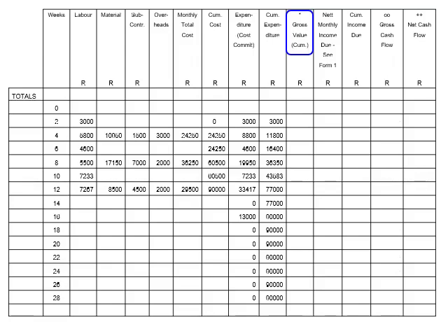For example, let us add 10% to 2000 by using this technique. 2000 times 0.1 is equal to a fraction of 2000, and equals 200, plus 2000 times 1, which equals 2000. The total is thus 200 plus 2000, which equals 2200. Therefore, for this calculation, we shall multiply the cumulative monthly cost by 1.1.